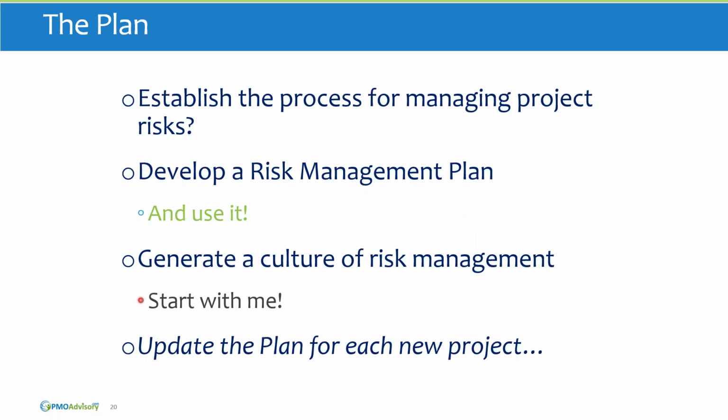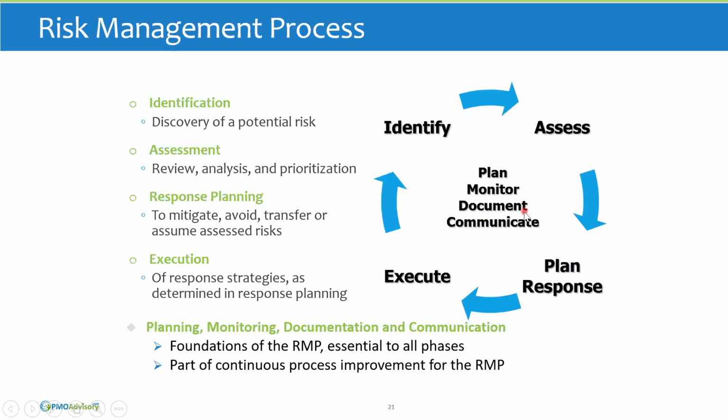How do I manage risks on my project, on my program? And that culture helped us to get to another level of risk management, which is really great. And then we want to update the plan for each new project. So we want to gain our lessons learned from the project and then update our risk management plan accordingly.